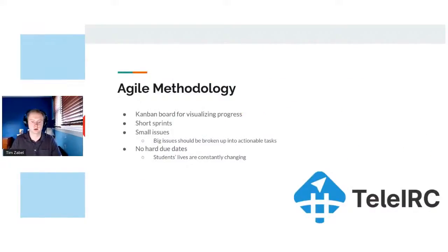With that, we really wanted to harp on the idea that we have really changing lives, and we, as students, get a lot of our own projects that we have to do for our classes. So we need to be able to have actionable items that we can realistically do within these 2 to 3 week time frames. In order to solve that, we figured out that short sprints were a really good idea, and having anything longer than 2 weeks became really unrealistic for being able to view what we could reasonably complete in a longer time frame.